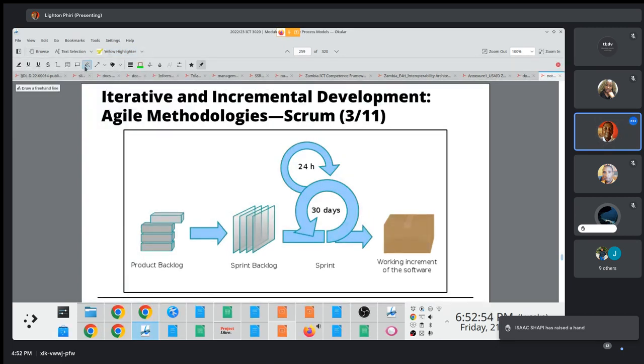In essence, when we have T1, we'll execute it, and right after T1, we'll have milestone 1. It doesn't have to be right after T1, but this milestone 1, that diamond thing, will come right after T1 like this. So you only attain milestone 1 at the end of T1.